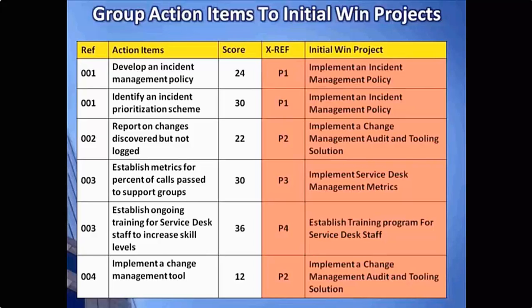Again, developing this can be done first by the assessors and then in a series of workshops to get consensus with your stakeholders. Remember again that by using this spreadsheet approach, we can easily sort by any column and reference back to the assessment finding that resulted in the recommendations used in the initial wins that we derived. Just an example of how this works efficiently is if I sorted by that XREF column, I would see all the P1s together and then all the action items grouped with those P1s, and then those action items would become really almost like a scope statement in terms of what would be underneath the covers for implementing an incident management policy, just in that example.